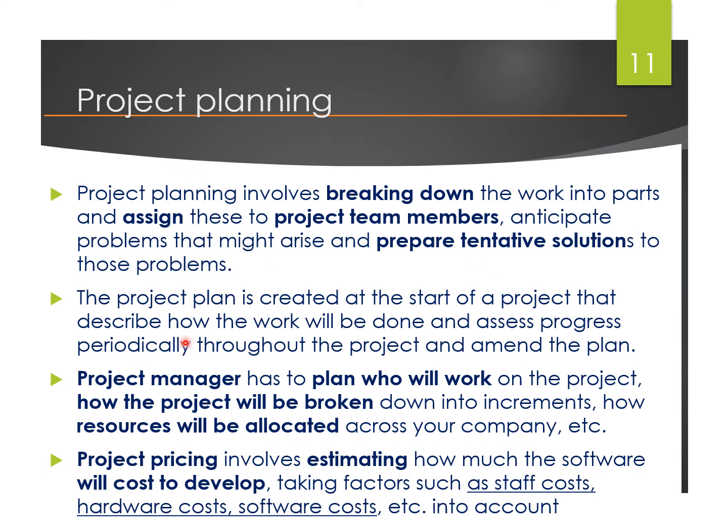And I've mentioned to you that it's the job of the project manager, who will plan the work, break down the tasks, and then allocate resources. Allocating resources is not only related to the staff in charge, but also to the hardware that you might need. Maybe at a certain point of time, you need the server to be ready to execute the testing, so it should be there, rather than when you need to use it, it is still not available, which will cause delay.